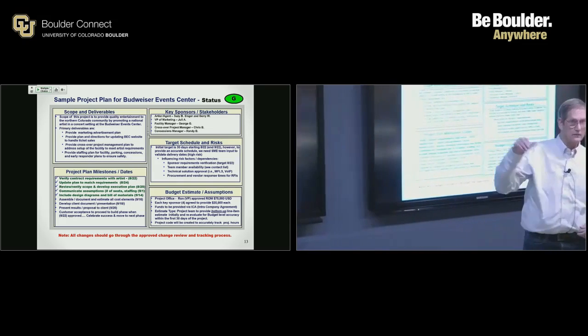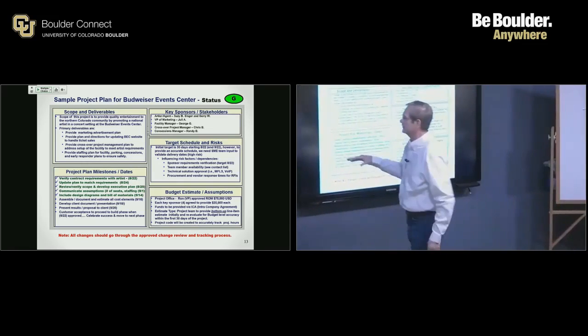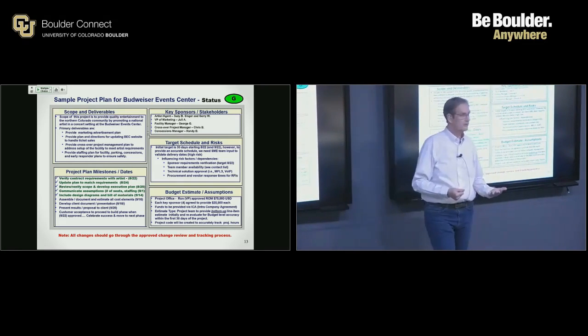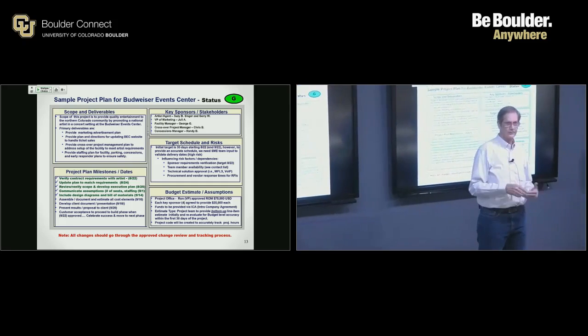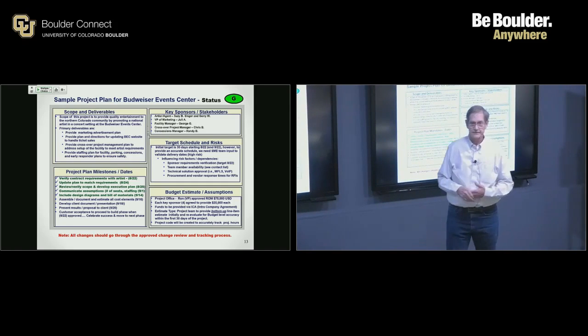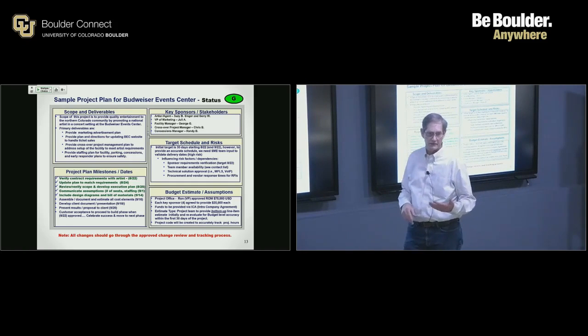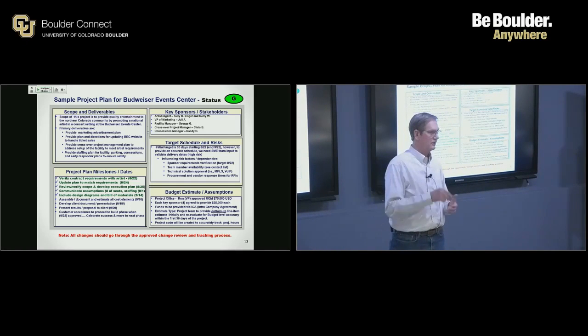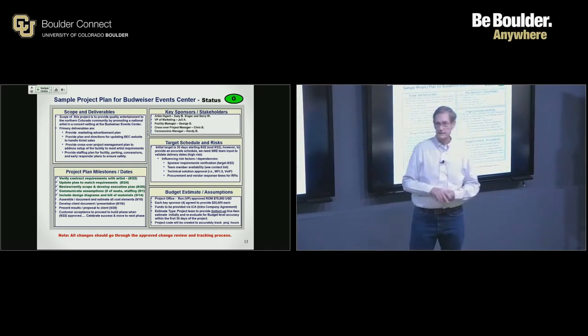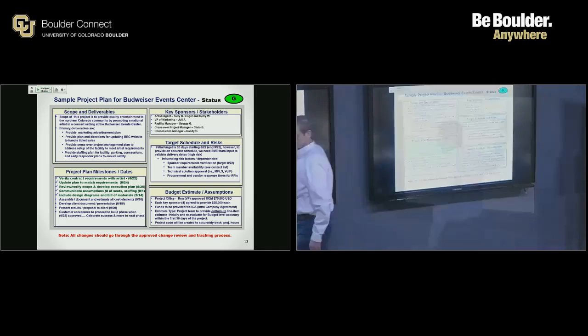How are we doing? We're in the green. That's a good thing, right? So traffic lights are very important. And then the initial is very important in case I print this out in black and white. Or in one case, I had a very powerful and very high-level manager as my project sponsor, and he was colorblind. So the greens and yellows and reds, he couldn't see them as clearly. So he asked that I put the initial in the box.